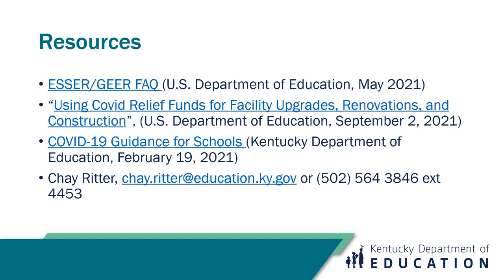That's why I have my facilities branch, but it does help you understand the totality of some of these projects. One of the warnings we've given a few times now is that the Davis-Bacon Act is important. You don't want to be in non-compliance with that. But also, if you feel like your project may not be finished on time, through delays or whatever, it's very possible that you're going to have to use your own funds to finish up a project, because this money will eventually finish up and the award date will end.